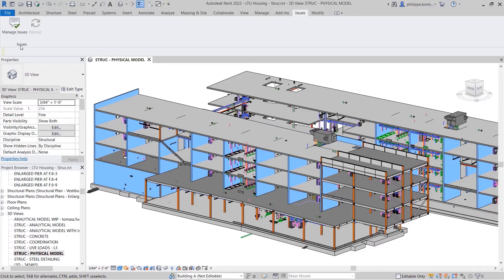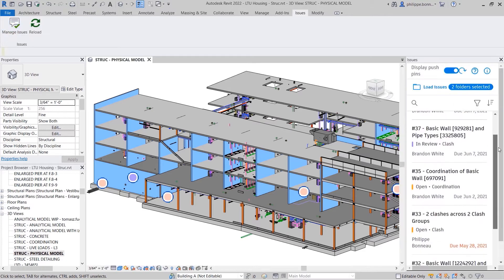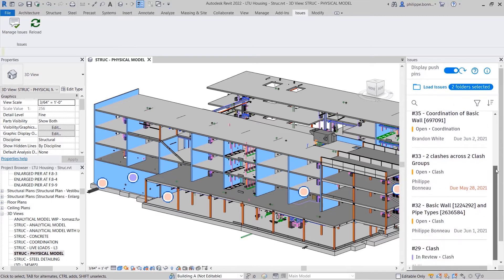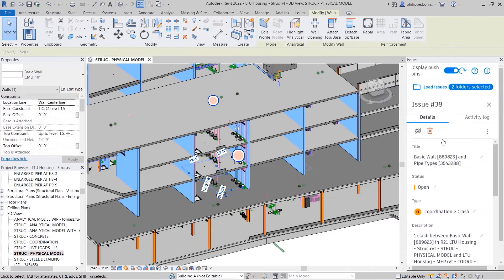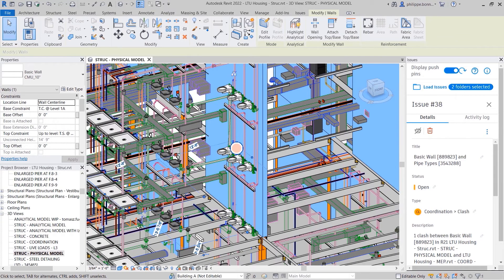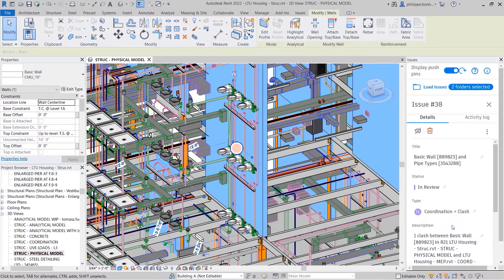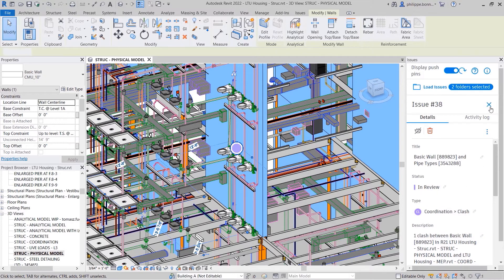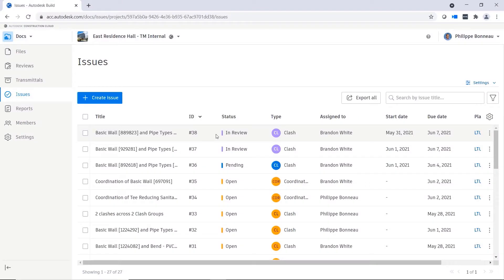The Revit Issues add-in enables you to view and respond to issues created using model coordination directly within the Revit project environment. Once you have reviewed the issue in Revit, you can update its status accordingly in the Issues panel. Updates to issues are immediately reflected in Autodesk Docs.